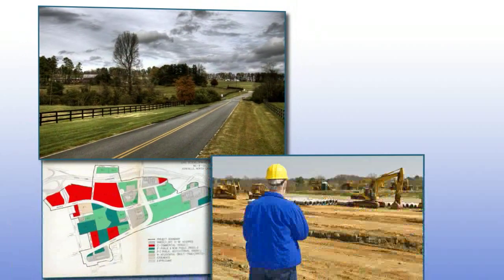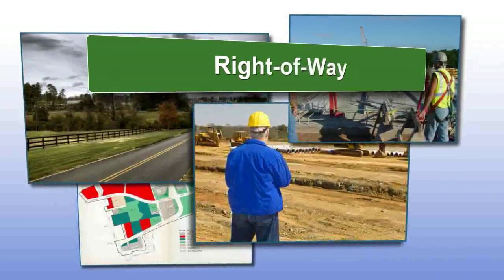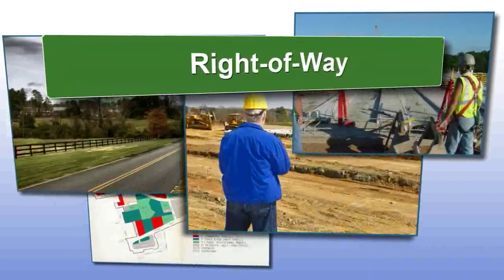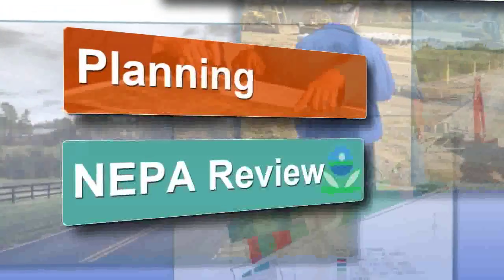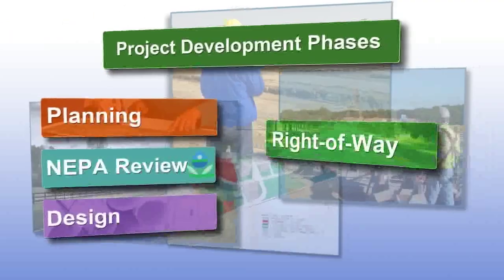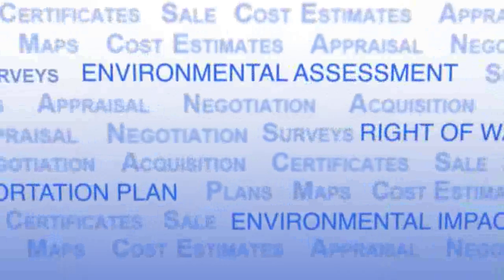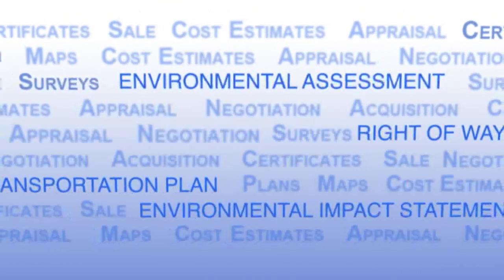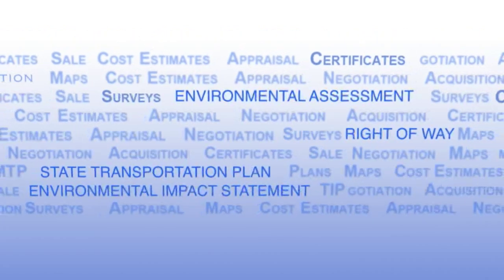Many highway projects require the acquisition of property rights for the project's right-of-way. Right-of-way activities may occur during any phase of the project development process, which includes the Planning, National Environmental Policy Act, or NEPA review, design, right-of-way, and construction program areas. These phases often overlap, and right-of-way regulations govern the right-of-way activities that occur in these program areas.